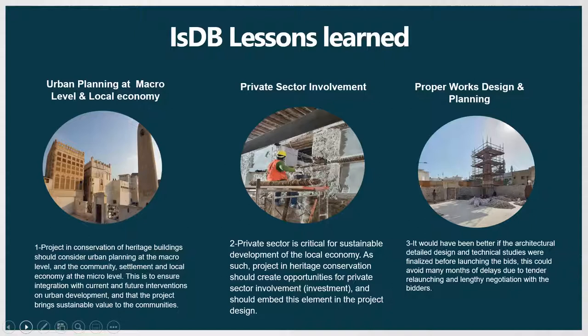Now, in terms of proper work design and planning, it would have been better if the architectural detailed design and technical studies were finalized before launching this. And this could have avoided delays in the tendering and the relaunching of some of these lots as well.